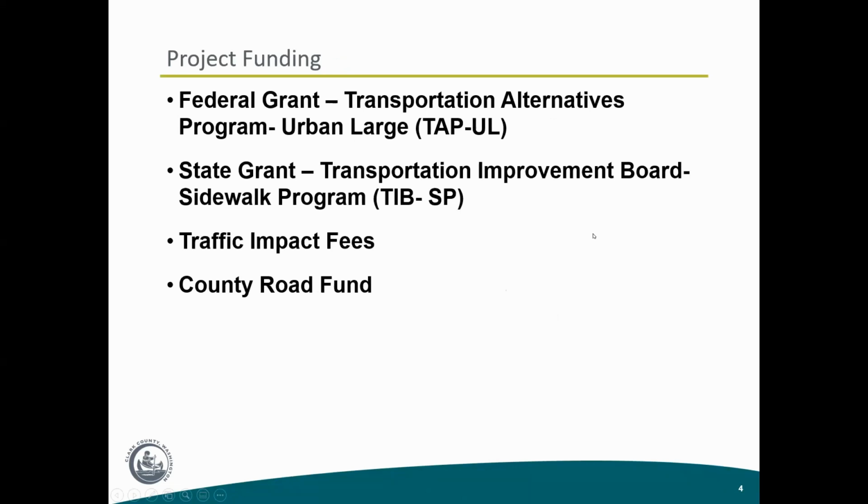For our funding for this project, Chris was able to secure federal grants. It was the Transportation Alternative Program, an urban large federal grant. And I believe that was close to $700,000 that he could secure for this project.